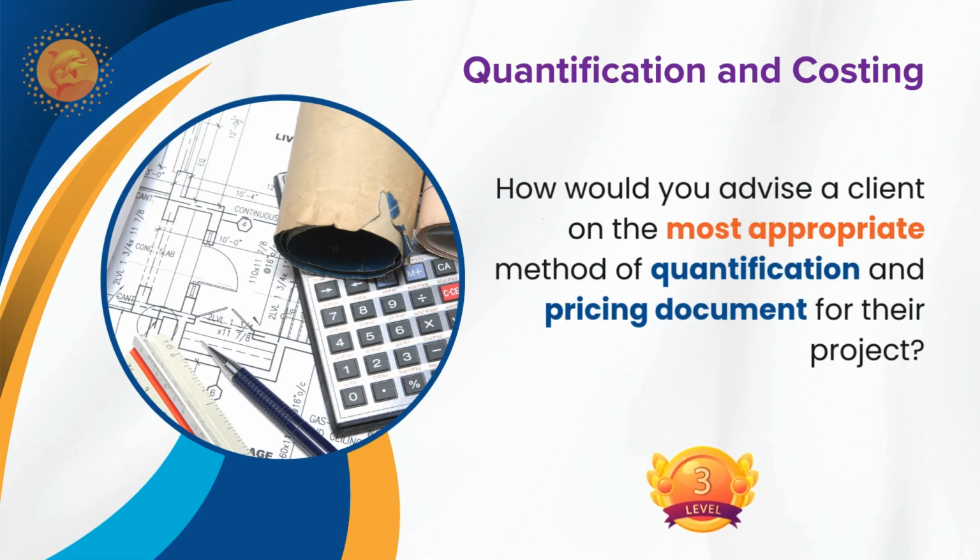And after that, based on the type of the contract, whether remeasurement or fixed or lump sum contracts, we will advise on the pricing. We can use, as an example, schedule of rates based on the lump sum contract, bill of quantities if the contract is remeasurement. Also advise him to use schedule of work, day work.